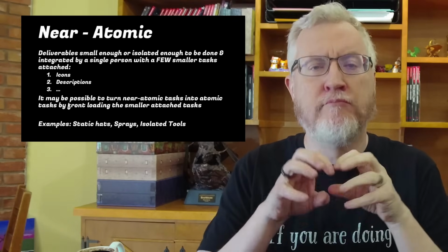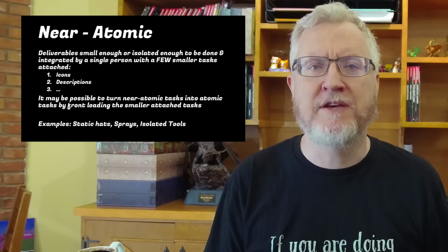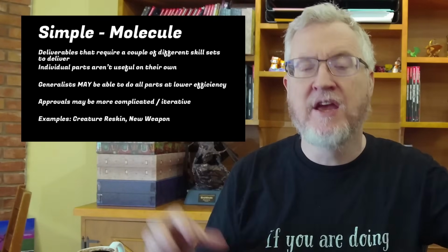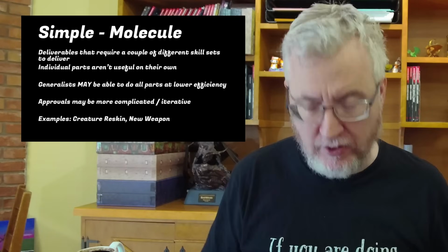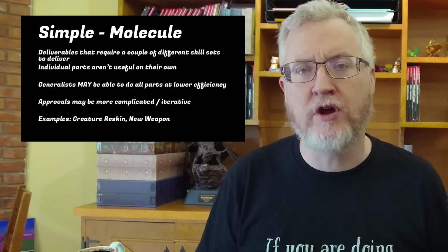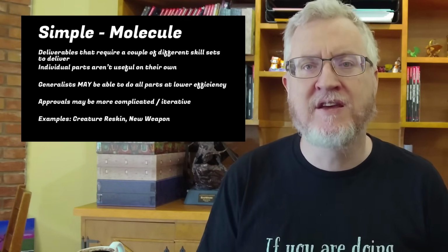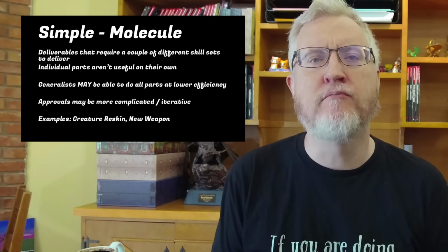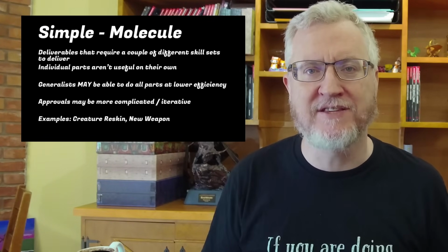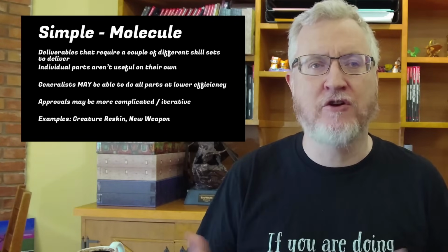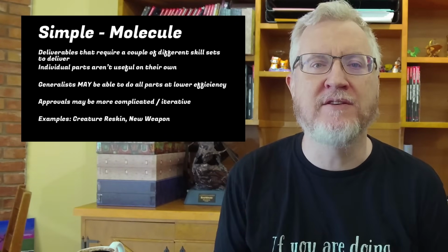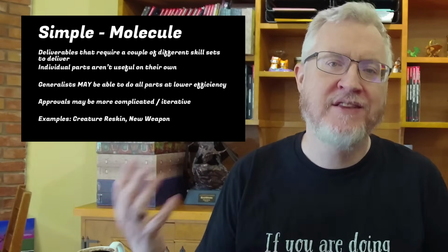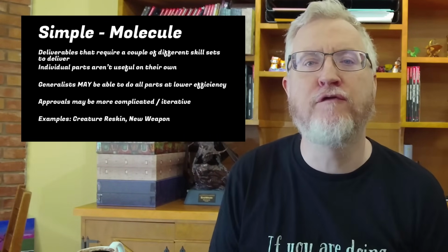As we move more complicated than this near atomic space, we're going to get to molecules. These require a couple of different skill sets in order to deliver. If I'm going to reskin a creature, I'm going to do some modeling work. It's going to need to be reskinned. It's going to need new textures, new materials. As we've gotten into more and more specialized skill sets, the number of tasks that are molecules has actually increased, because in the past, one creature artist would have done all of the things I just said. These days, that could be 2, 3, even 4 people.